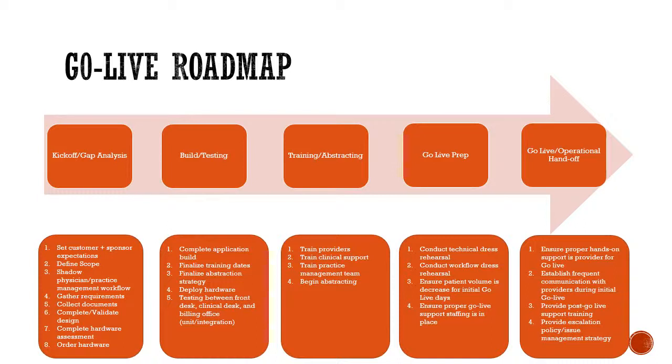During this first phase, we'll define the scope of the project. You will expect some sort of shadowing of your physicians, your practice management, your front desk staff, your billing staff, to get our understanding of the requirements that the practice needs to be successful, and to also draft some workflows for the various different kinds of workflows.